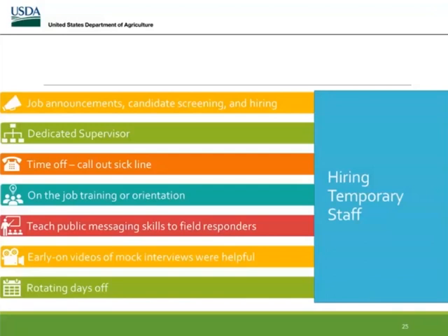It was just an answering machine where a temporary staff person could call in and leave a message saying, hey, I'm going to be out today. And then the dedicated supervisor can log in early in the morning, grab those messages, and then go to whatever section or team and explain to that team leader that their personnel was going to be out that day.